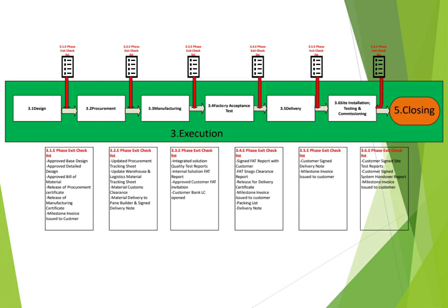So the procurement team need to check the prices in the estimation in the beginning of the project and the recent request for quotations received, and highlight if there is any variance, any increase in the cost to be discussed with the project manager. So here, this is a very important stage.